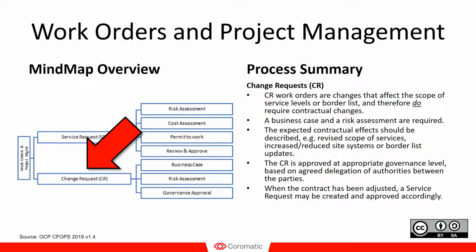And that means that before you make a change request, you should have a business case showing the value of this proposed change. You also need to include a risk assessment to show what could be the potential negative consequences or the risks with this, and how these risks should be mitigated. In a perfect world, that means eliminating the risks of something going wrong, but in reality, it often means how do we minimize the risks, or how do we try to compensate for any potential risks so that we can avoid them.